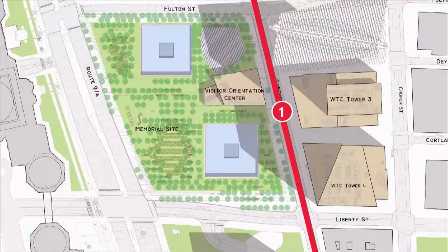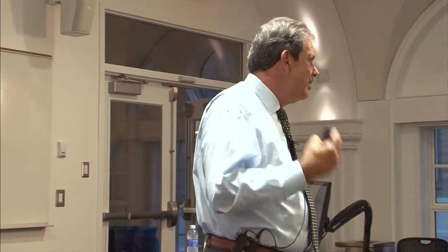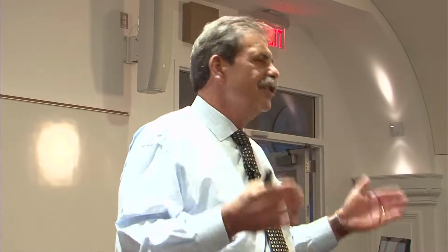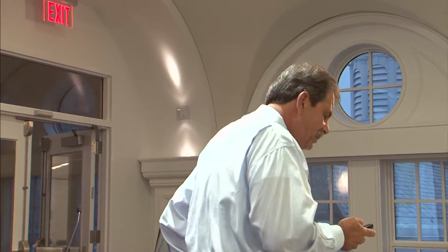So that was one challenge. Another challenge, and I'm going to talk about challenges to the job right now, was the one line, rebuilt immediately after 9/11 as a commitment by then Governor Pataki. We had told them, let us shut it down again. We need the space. We need to build under it. We need to be able to deal with it. It will save the Port Authority, save all the stakeholders, tens of millions, if not hundreds of millions of dollars to allow us to shut the subway down for a period of time, tear it down, and rebuild it again, but in accordance with the overall plan. The governor refused. I made a commitment to the people of New York to get the subway going, maintain the connection to the Staten Island ferry, and it became a constraint on the job.